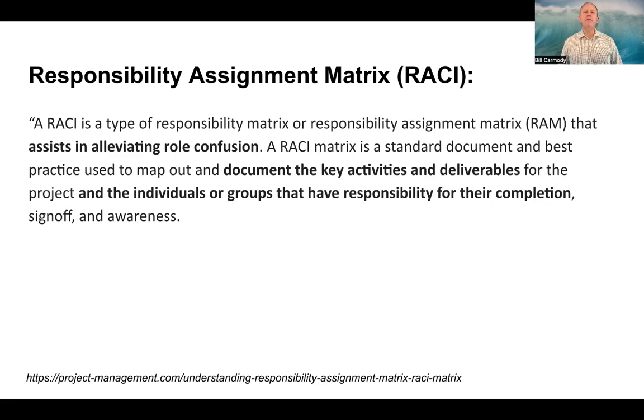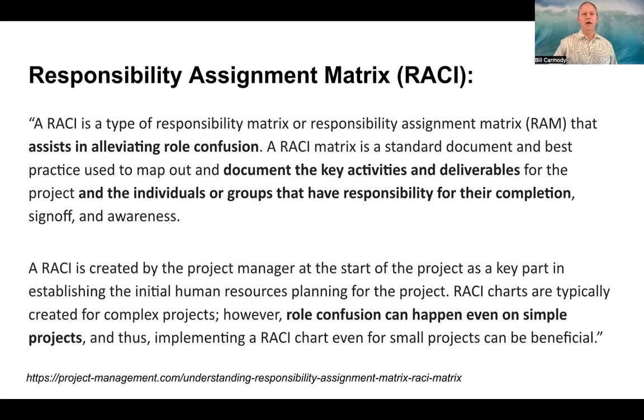RACI is a type of responsibility matrix or responsibility assignment matrix that assists in alleviating role confusion. A RACI matrix is a standard document and best practice used to map out the key activities and deliverables for the project and the individuals or groups that have the responsibility for their completion, sign-off, and awareness. A RACI is created by the project manager at the start of a project and is a key part of establishing the initial human resource planning for the project.